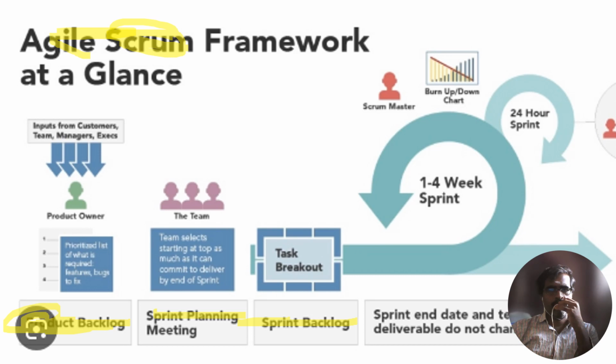A sprint is a time box, so it depends on the client and the team, the Scrum Master, product owner, everybody. This means that its duration cannot change irrespective of whether all items have been successfully delivered or not. Undelivered items are moved back to the product backlog to be taken into a future sprint. The duration of a sprint never changes no matter what.